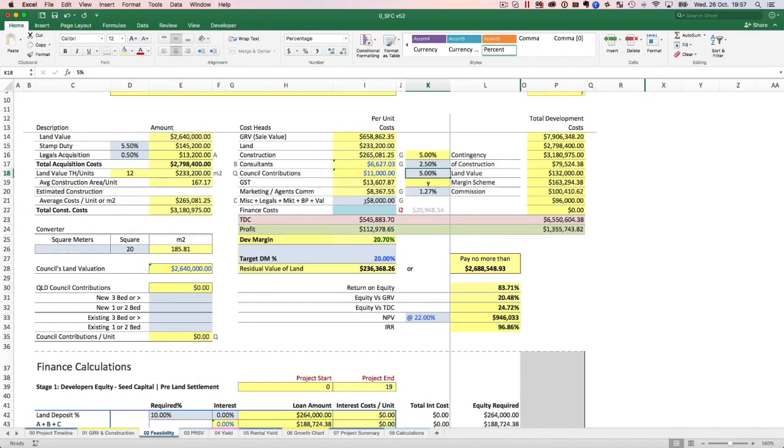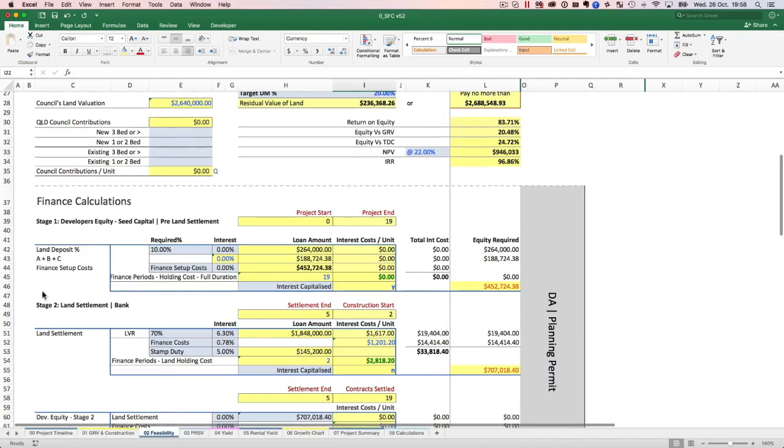So that's what this is. Now everything in pink is your total development cost. So this unit, which will average sale would be 658,000, you can now acquire for 545,000 if you develop it. So it's about 112,000. But at the moment this number isn't correct because I haven't put in my finance cost. And one of the main reasons of this update is to be able to calculate the finance cost accurately. So I'll leave that blank until I've done all my finance stuff.